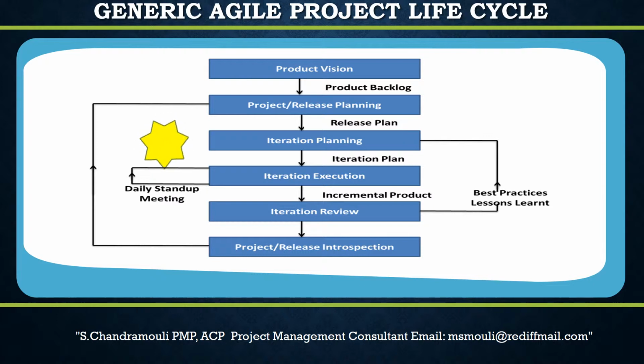Types of release plan. Two basic types of release plans that are widely used are scope-boxed release plans and time-boxed release plans. In a scope-boxed plan, the work, that is, what the team will do, is defined in advance, but the release date, time, is uncertain. In a time-boxed plan, the time and release date is defined in advance, but the specific work of what people will do is uncertain, and is being elaborated with time.